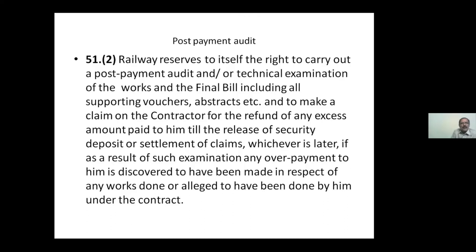Clause 51(2) of GCC comes in use for you. So you have to invoke the provisions of 51(2) of GCC and you will write to the contractor. Generally, you will not be having any contracts in any other division of your railway. In that case, what you have to do? You have to take legal action against him. So all these provisions are available for the recovery of excess payment in case it has been paid as per 51(2).